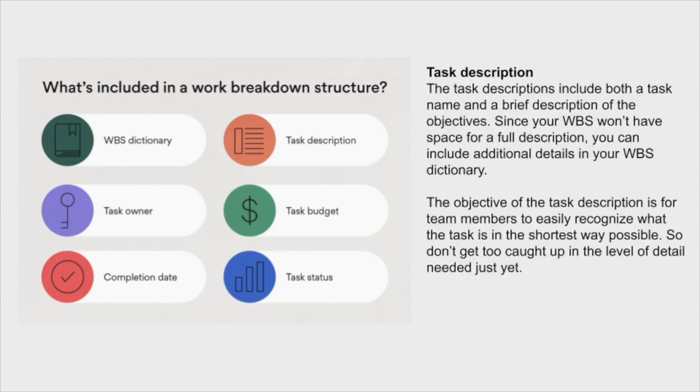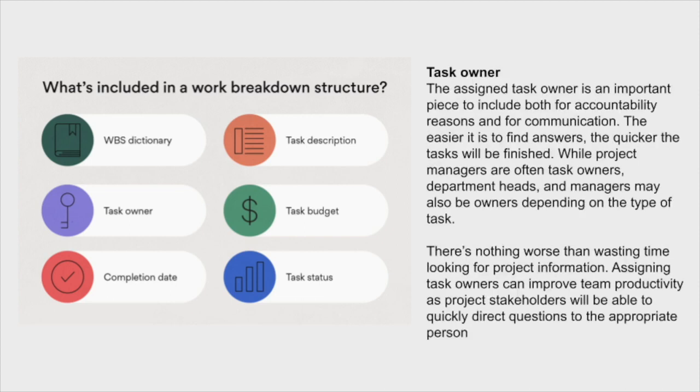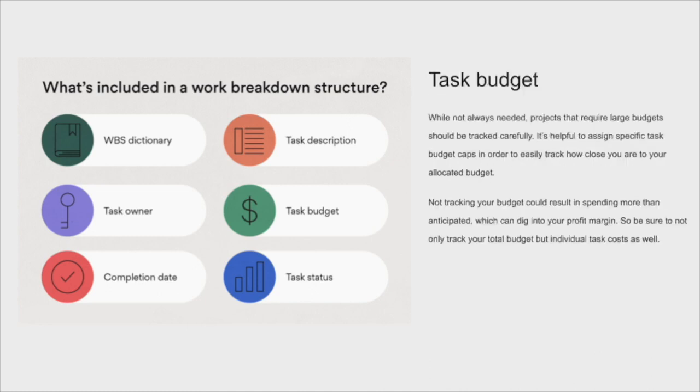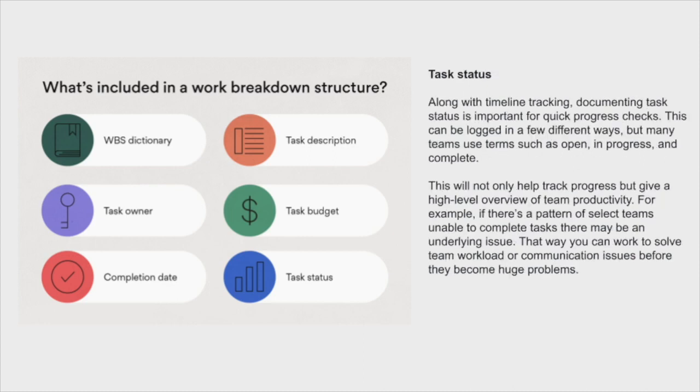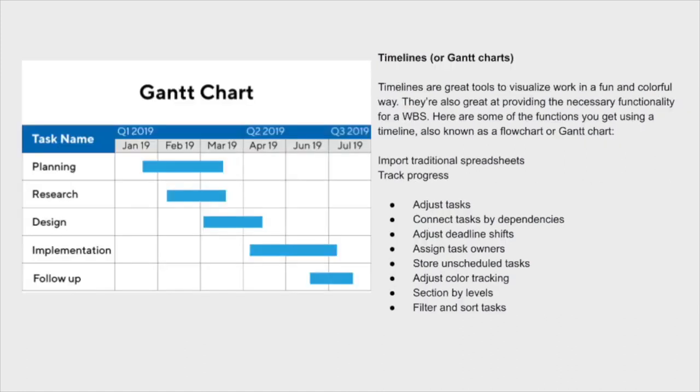It names them, clear and simple, gives descriptions of what each of those tasks would be, what the exact deliverables are, what the budget is going to be, what some of the key milestones are, the things that we need to meet, when we're going to meet them, who assigns the approvals, and the points at which the approvals would be required. And it would also include a timeline.